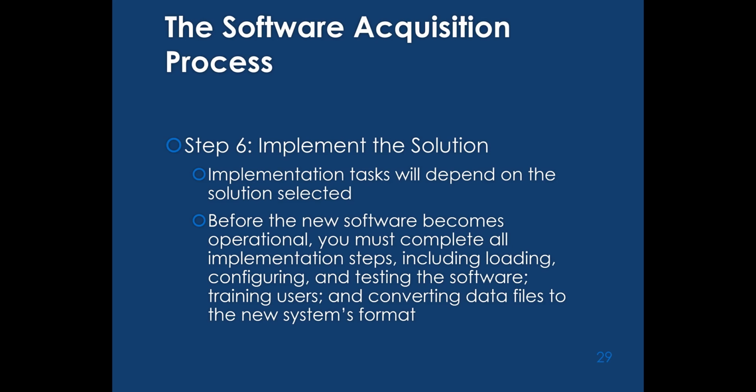And also, if the business has been running for a while, that means you also have legacy systems that ran before. The thing that we need to do is convert the data from the legacy system, or the as-is system, to the to-be system so that the new system has the data ready to run. Apart from that, you also need to make a decision on how to run the new system.